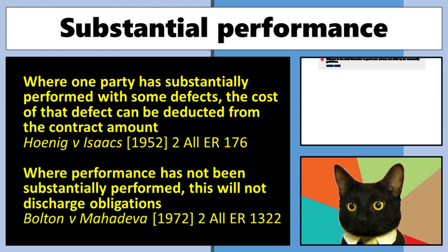And we're not under an obligation at this point to accept that. If we're the purchaser, we can say, hey look, it's going to cost all of this money to fix it, and we can go through and do that. But the usual procedure in that situation is to say, this is a breach, it's a fundamental breach, we're not going to pay until you've done what you said you're going to do. All right, it's a fundamental breach. And the side that's only done half the job is not going to be able to go to court and say they've discharged their obligations if the work requires a substantial amount of things to finish it. Okay, does that kind of make sense?